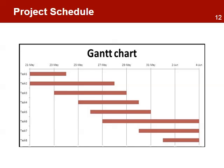The project schedule is represented in a Gantt chart that shows when each activity starts, how long it lasts, and when it will be completed. This is usually represented in the form of a bar chart, which sets out the sequence of activities and links them to critical events or milestones. This chart is a graphical representation of the time required to complete each activity and the time to complete the whole project. The Gantt chart is simple, easy to read, and can be used to track progress against time. The chart uses the activities from the work breakdown structure as headings for each row, and time units — years, quarters, months, or weeks — as the headings for each column.